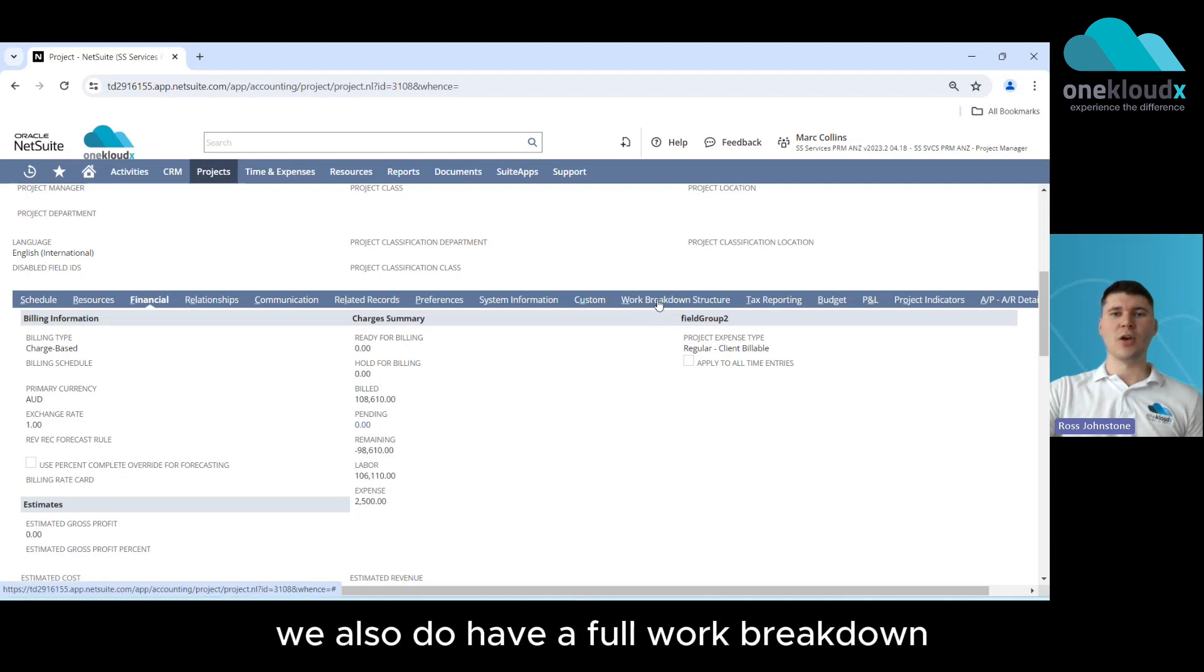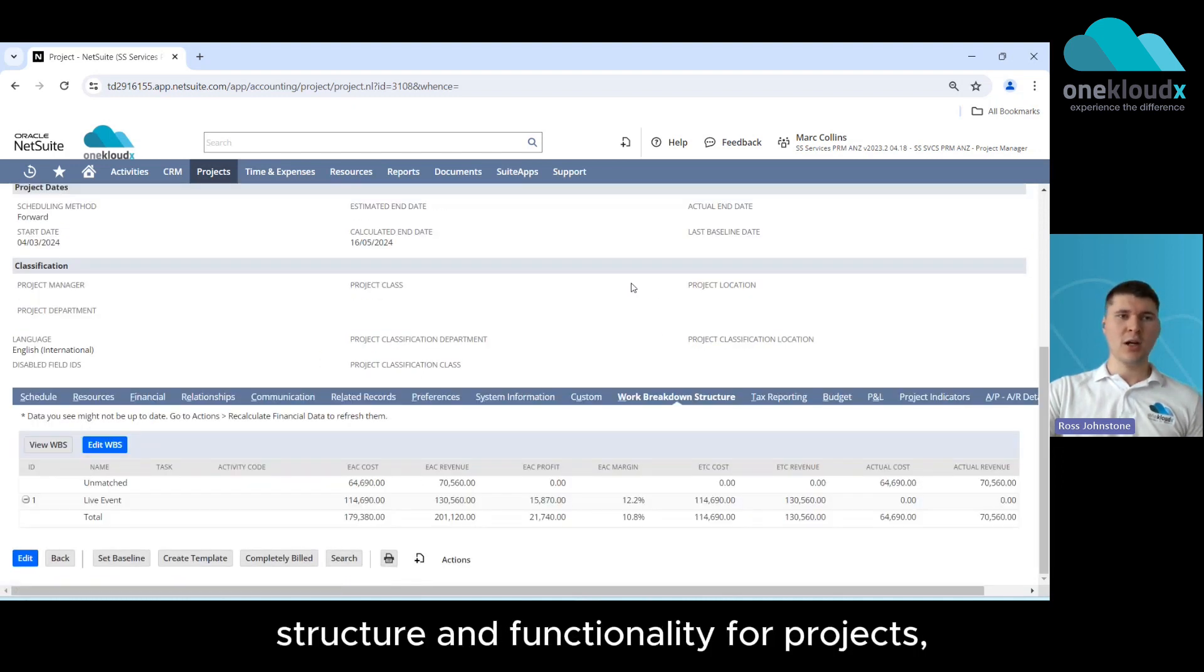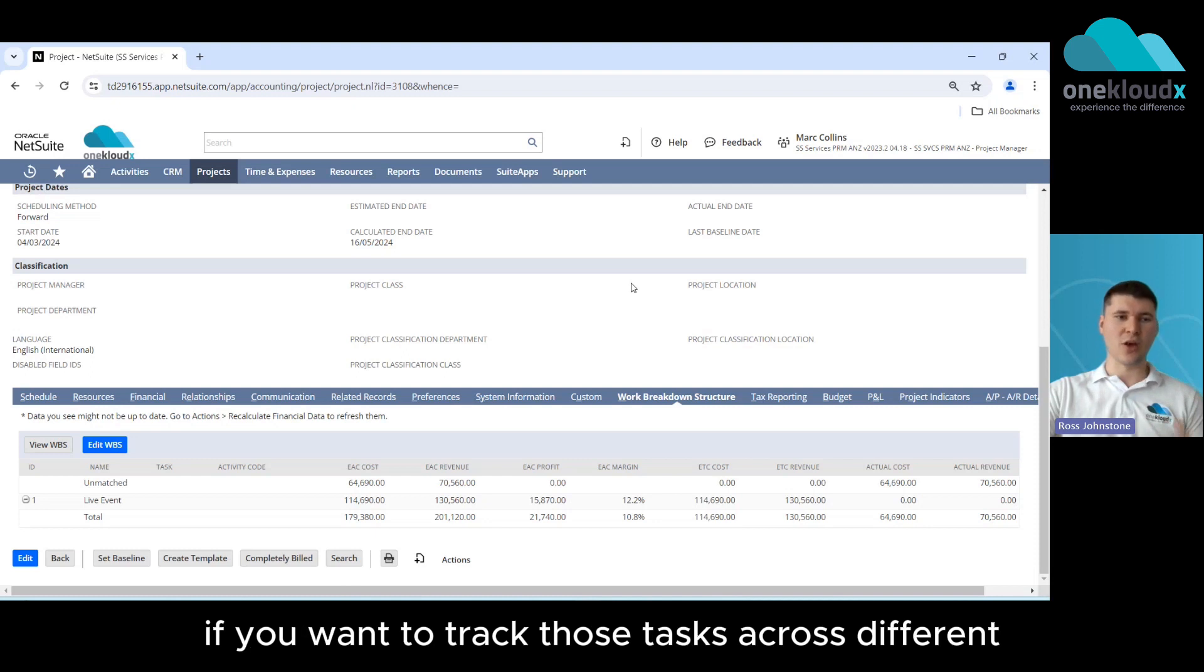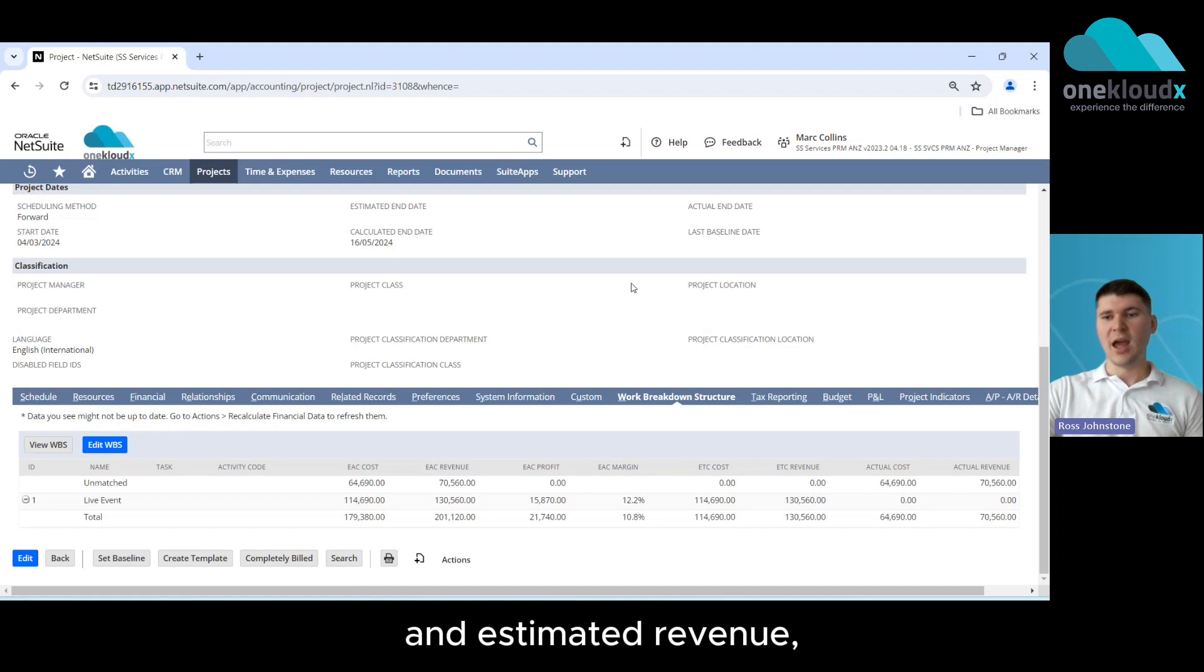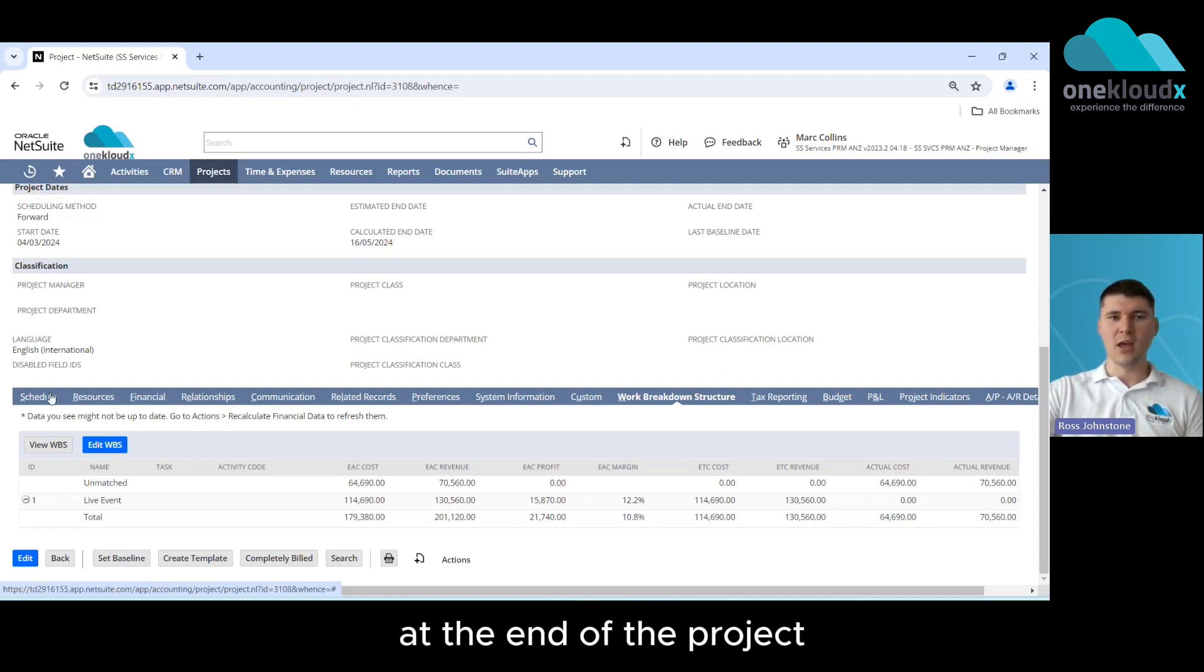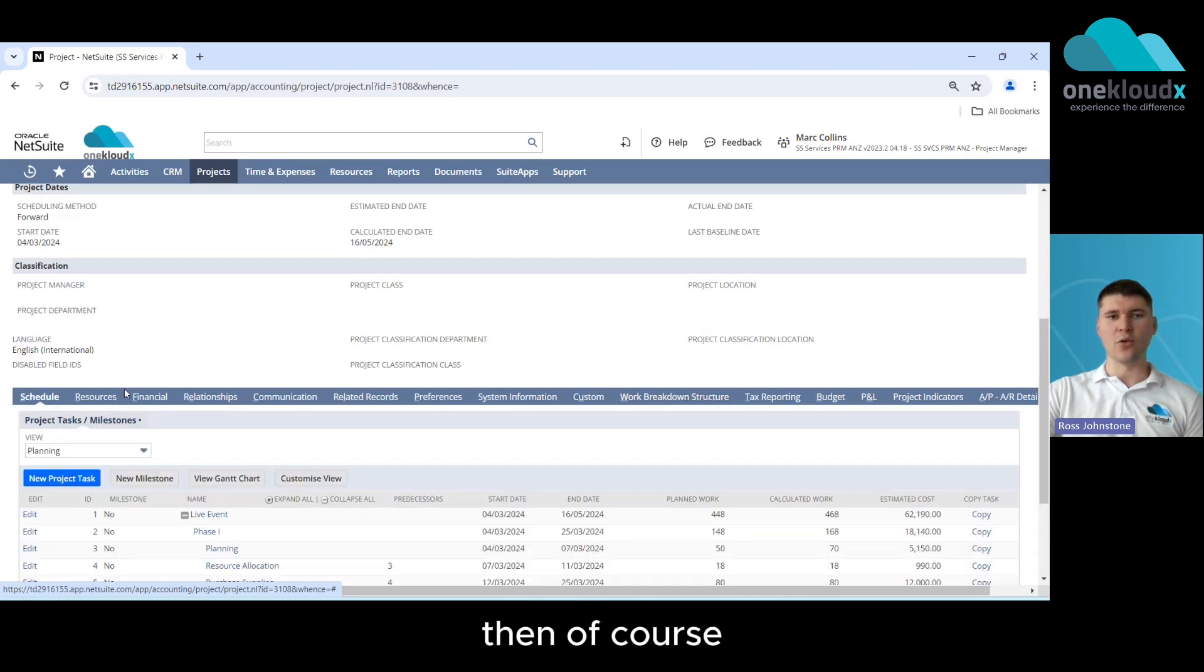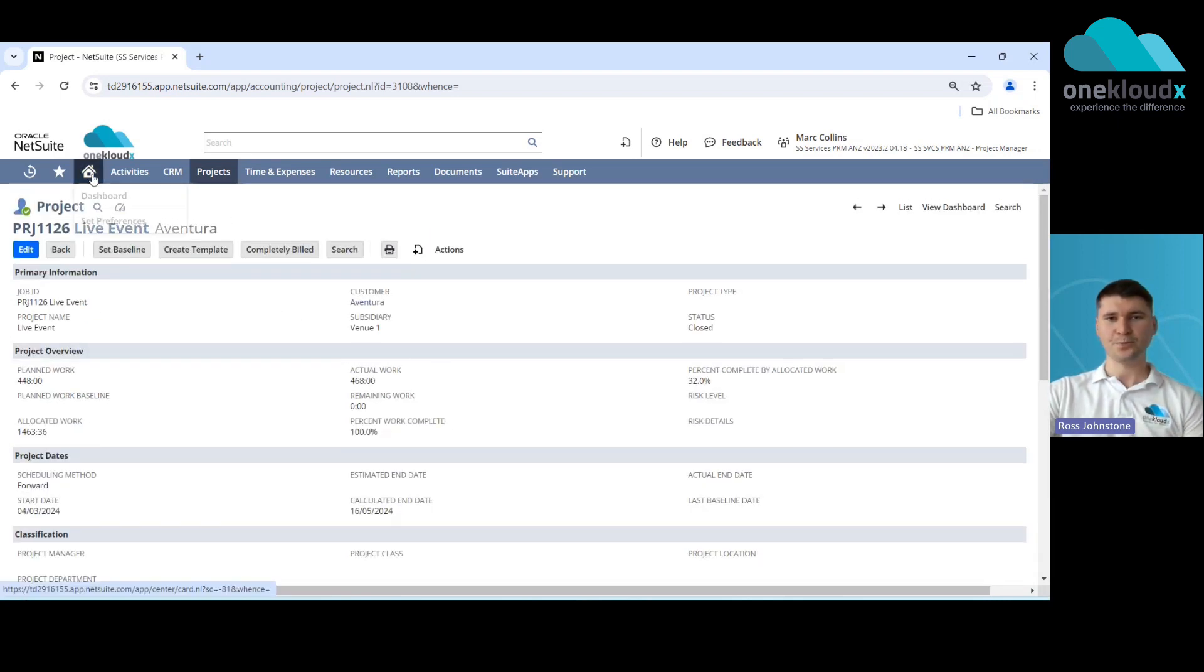Now beyond that as well we also do have a full work breakdown structure functionality for projects so if you want to track those tasks across different estimated costs and estimated revenue and then compare that to the actual cost and revenue at the end of the project or throughout the project then you can have that functionality within NetSuite as well.